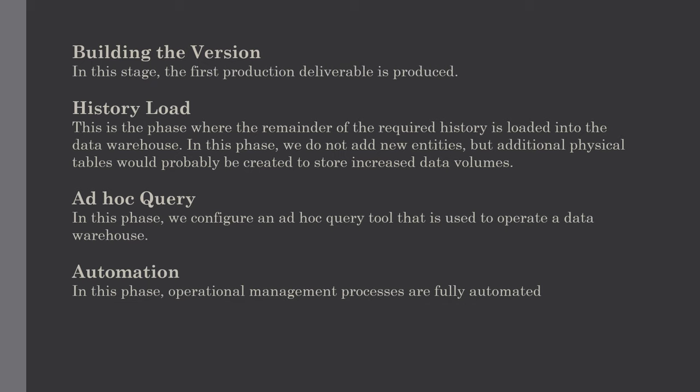The next phase is history load. This is where the remainder of the required history is loaded into the data warehouse. In this phase we do not add new entities, but additional physical tables would probably be created to store increased data volumes. For example, suppose the build version phase delivered a retail sales analysis data warehouse with two months of history — this allows users to analyze only recent trends. To also identify annual and seasonal trends, the last two years of sales history could be loaded from the archive. The backup and recovery procedure may become complex, so it is highly recommended to perform this activity in a separate phase.